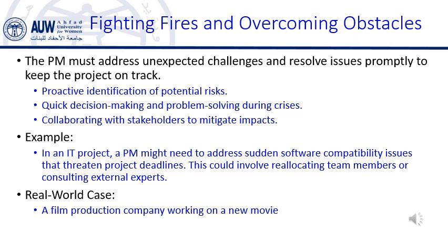Example: in a construction project, if the supplier for materials like steel suddenly experiences a delay, the PM might find a different supplier or adjust the schedule to accommodate the delay. Alternatively, the PM could reallocate resources from other parts of the project to keep things moving.